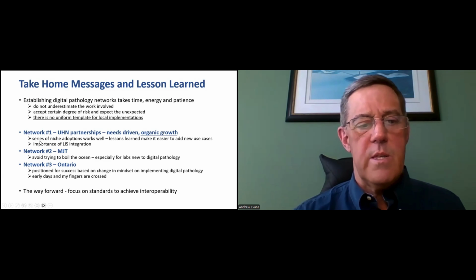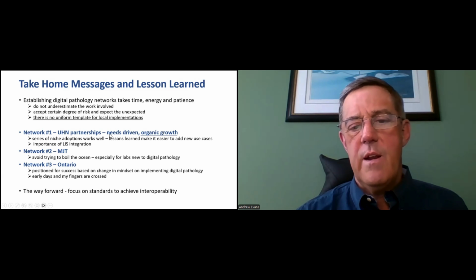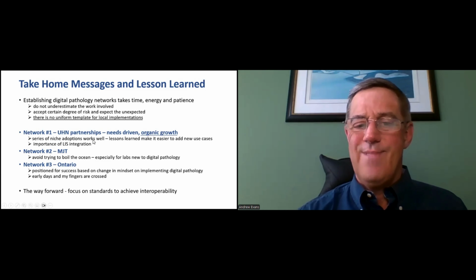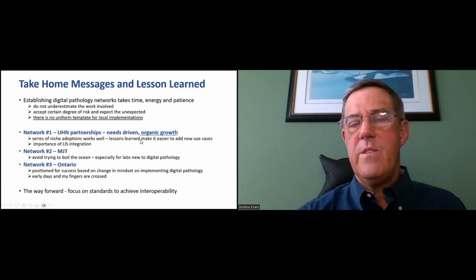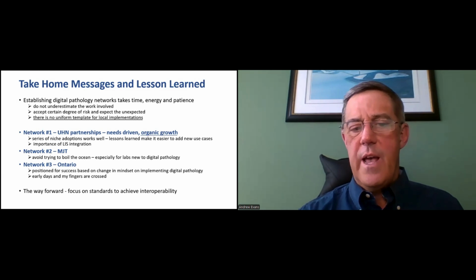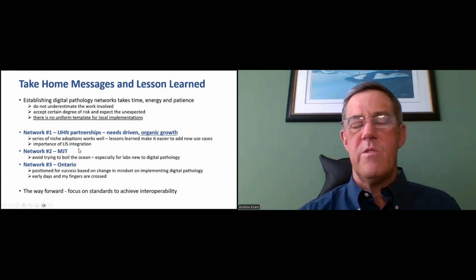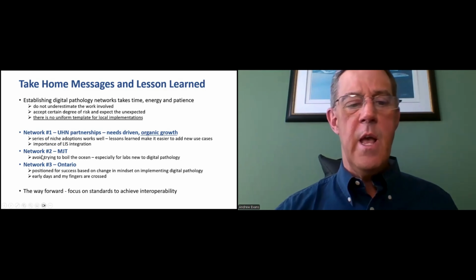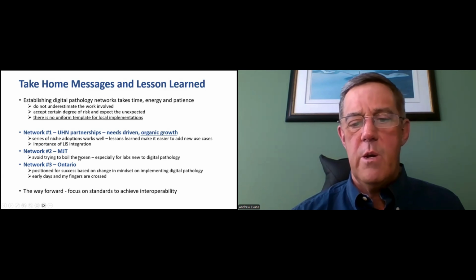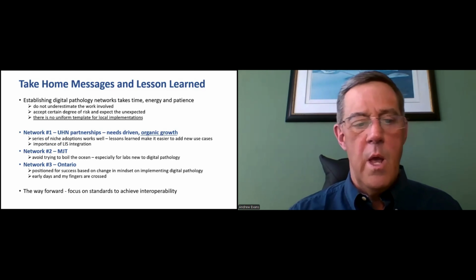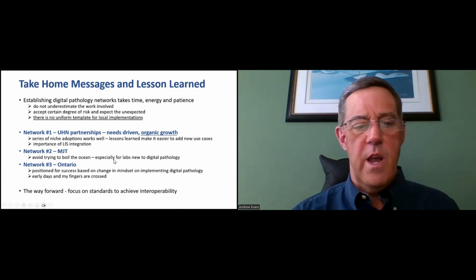In terms of the network projects that I mentioned, Network One, the UHN partnerships, I think that illustrated the importance of taking a needs-driven organic growth approach. So starting with a series of niche adoptions does work well. You can start by learning lessons with easy, very focused applications, and it makes it easier to add on new use cases. These partnerships also illustrated the importance of LIS integration. For the MJT, my bottom line take-home message is avoid trying to boil the ocean, especially when you're working with groups where there's a disparity in digital pathology experience across the group. Expectations need to be managed very carefully there in terms of implementation timelines and goals.